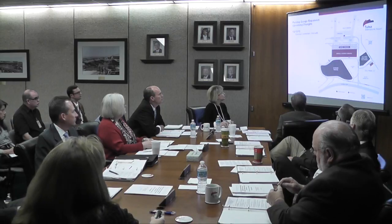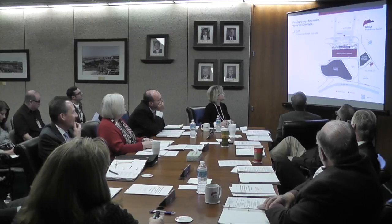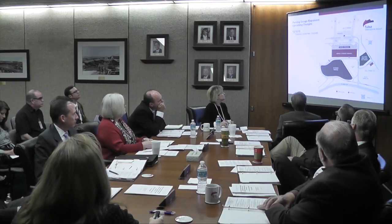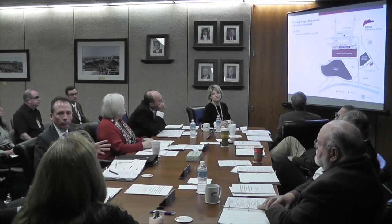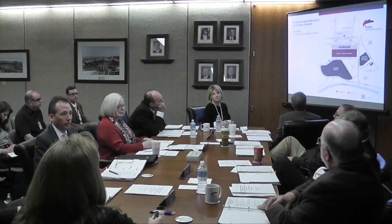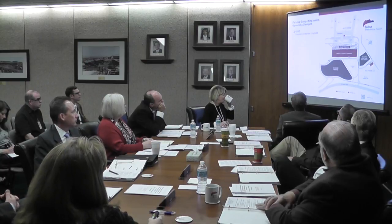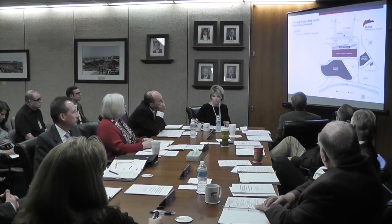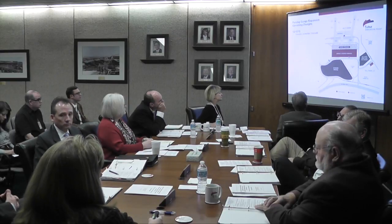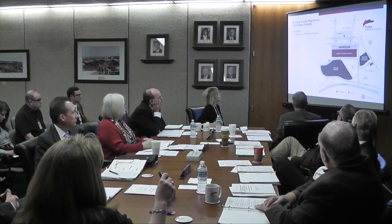The first phase is going to start next week with the demolition of a crosswalk up on the A side. It's only going to take about a week. This is a location where they're going to be building new elevators and stairs. There's another crosswalk just to the west that the public can use. Our big concern is making sure people know how to get down to the rental cars. If people want to use an elevator, they'll have to go down to the center. So we're working on getting the signs up so everybody understands how to navigate that space.